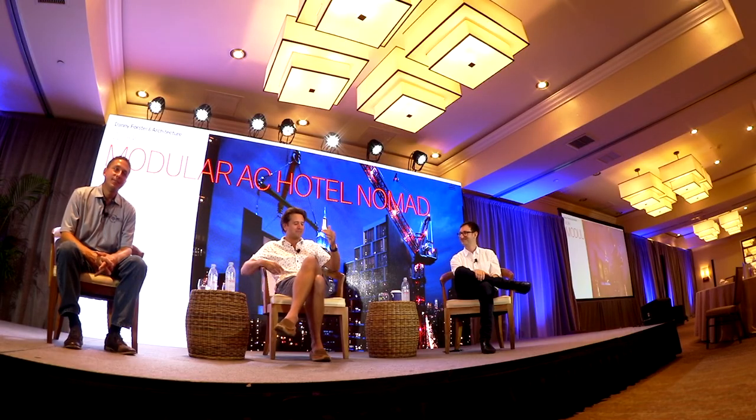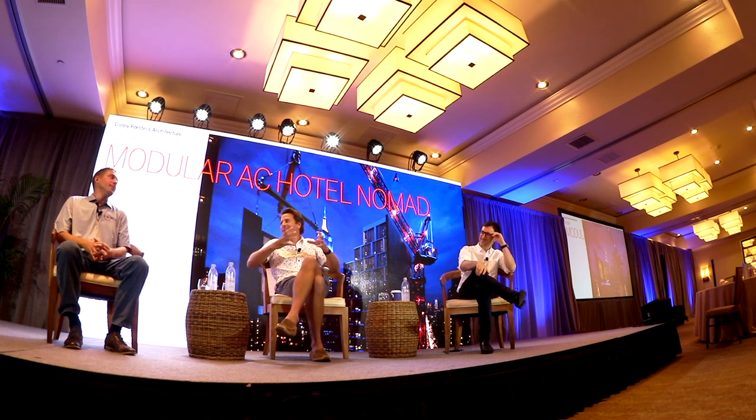So obviously we're pioneers in this, and you're probably thinking what I was thinking, that these things are going to be built in factories, so it should be very nice and clean. I'm imagining an auto factory that's been doing this for years. We had some challenges with the modular guys understanding the expectations. Marriott knew that and coached us up, saying you're going to help these guys understand the expectations. So we did have some challenges with quality because, honestly, they didn't know.